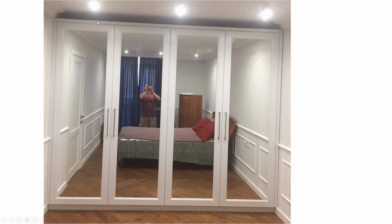And then I'll probably have to have this all taped up, and there'll be some painting going on and putty work, and then the painting to get it all to match and sync. So I think that and doing the baseboards there is probably, like I say, a 4 to 5 hour job.